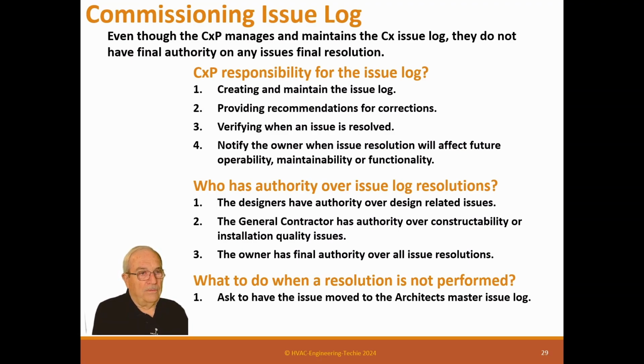It's really important. So what I always do is ask the architect, look, I've got a few issues I've not been able to get resolved. Can I move them to your log? And I've never had one object. Yeah, sure, why not? It's just that he doesn't have the knowledge to see that that's wrong, but he's more than willing to help. And this actually does work.